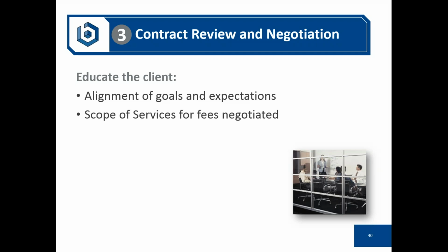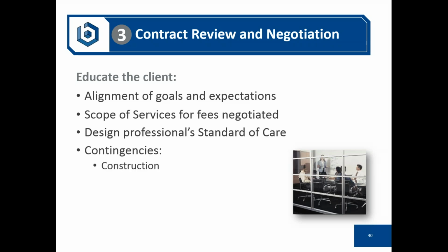The other thing that may have changed is the scope of services you propose for the fees that are ultimately negotiated. I think we've all been in a situation where we've proposed a fee, and then that client wants that fee to be a little bit less. When that happens, we like to see that there's some reduction in the scope of the services, not enabling falling below the standard of care, but just so that they know that, hey, we gave you this fee because we are going to provide all these services and all these deliverables. You want something less? We're going to give you something less. So try to get on the same page with that, with a really good understanding of what basic services are, supplemental additional services are, and the like.